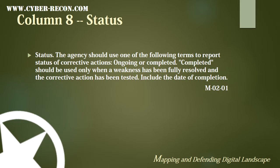Column 8 will identify the status of the finding. The agency should use one of the following terms to report the status of corrective actions: ongoing or completed. Completed should be used only when the weakness has been fully resolved and the corrective action has been tested. This should also include the date of completion.